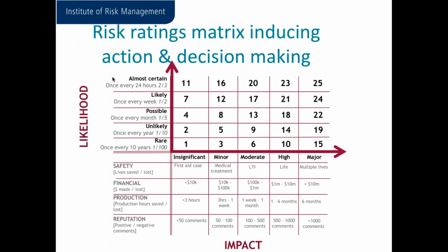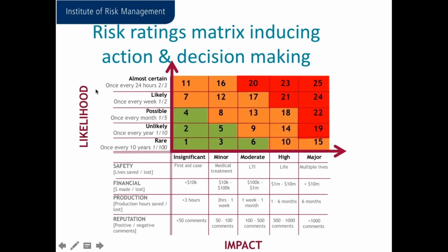And then we can put these ratings together to start to build up the risk matrix that we looked at earlier. As you can see here, we've built that up. We've got the likelihood and the impact in there, and then we can put the colouring systems in. So once the matrix and the rating scales have been agreed, then we can start to score our risks. So we need to understand these and we need to develop those. Otherwise, we're going to be very subjective.